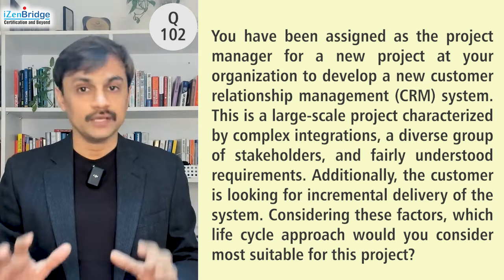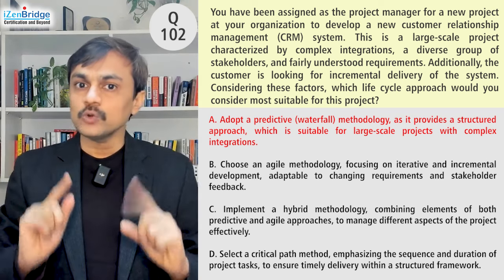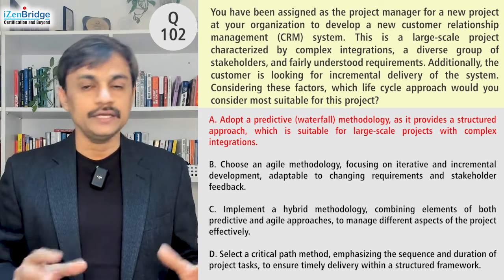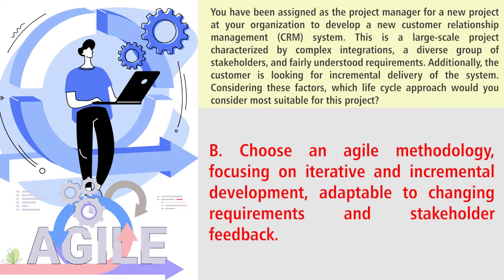Option A: adopt a predictive methodology, as it provides a structured approach suitable for large-scale projects with complex integration. This is a possibility, but the question indicates 'fairly understood' requirements — not 'well understood.' That's one question mark. The second issue is the question clearly shows stakeholders want incremental delivery, so going directly to predictive may not be a good idea.